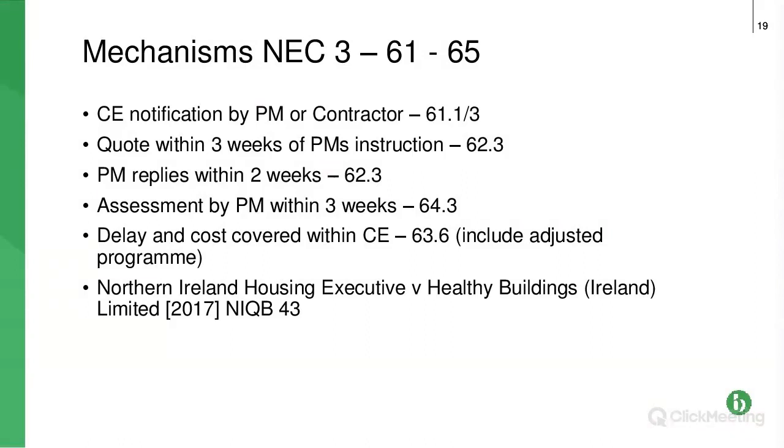If you're a contractor or a subby, probably not, because effectively what it said was that at the end of the day, if you're going to dispute resolution, it doesn't matter what you said in your quote. What the court is interested in, what an adjudicator is interested in, is what your actual costs are.